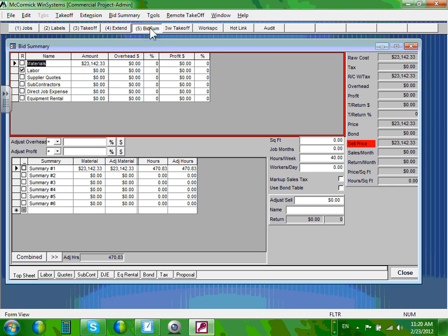Summaries. Yeah. So we're under summary 1. Yep. And if we were to do a summary 2, good. You can run a report based on NICA 1, price 1, summary 1, NICA 2, price 2, summary 2. It gives you multiple scenarios to run. And you compare them. Yeah, you can run enough reports to drive you nuts. Make sense? Okay.